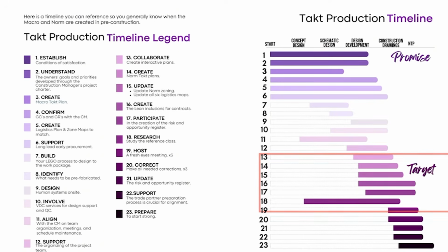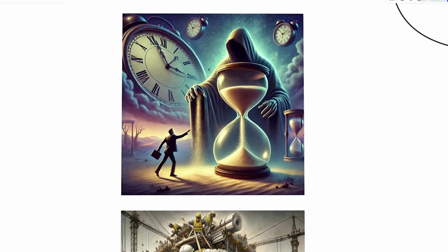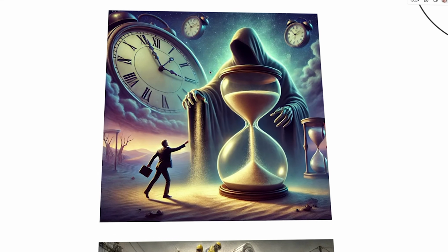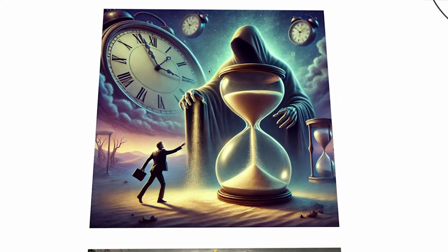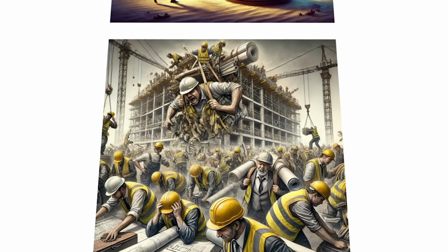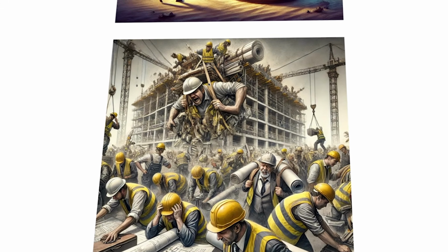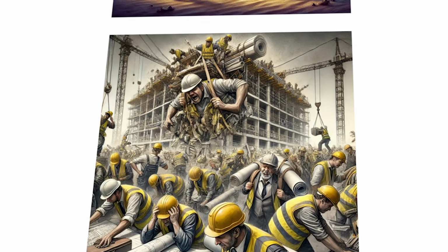You should at least start that in design development, okay? Now, takt will become your base. And I want to have a little bit of fun here with you and explain that if you have a CPM, that's like stealing time from the trades and creates a hopeless scenario because they are being pushed along a critical path without buffers. If you are using CPM instead of takt, this is what you can expect on your job site. Overburden of trades in too many areas and stacked all in one area.